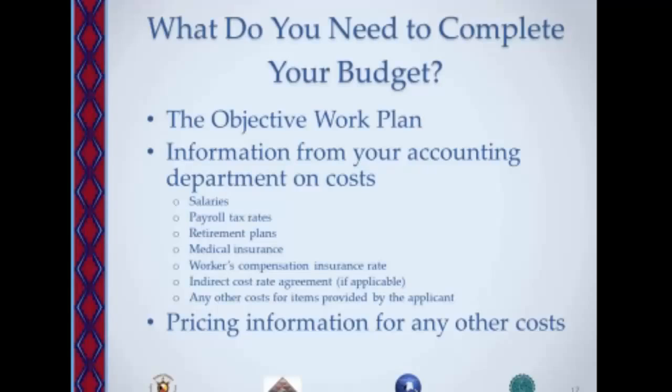If you are proposing a consultant, get a letter or statement of work from them that indicates their rate and what they'll be doing on the project. Again, last year I saw a lot of applications where they were proposing cost for a consultant. Some of them were very high-priced consultants, and there was no backup information for me to refer to determine how they came up with this cost. Why is this consultant so expensive? What is the consultant doing? So while you're gathering up that information, see if you can get that determination from that consultant.